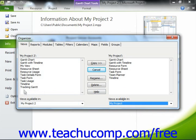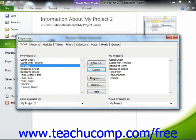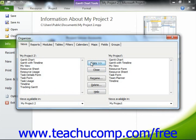Click on the name of the specific object to transfer, and then click the Copy button to copy the object into the listing at the right side of the tab. Doing this will copy the selected object from the project file that you selected at the left side of the tab into the project file that you selected at the right side of the tab.